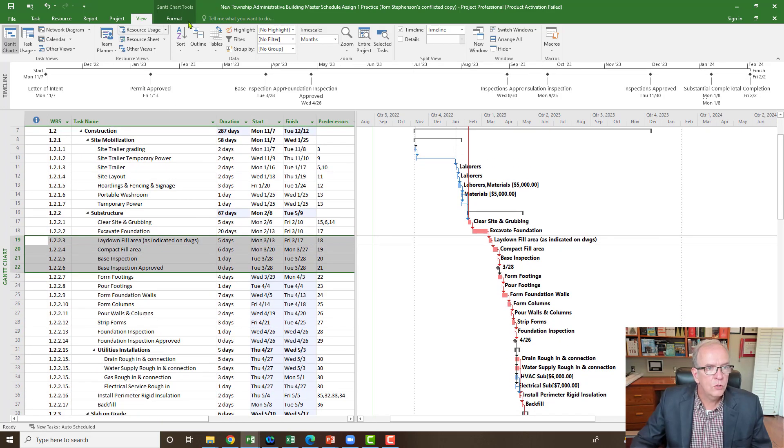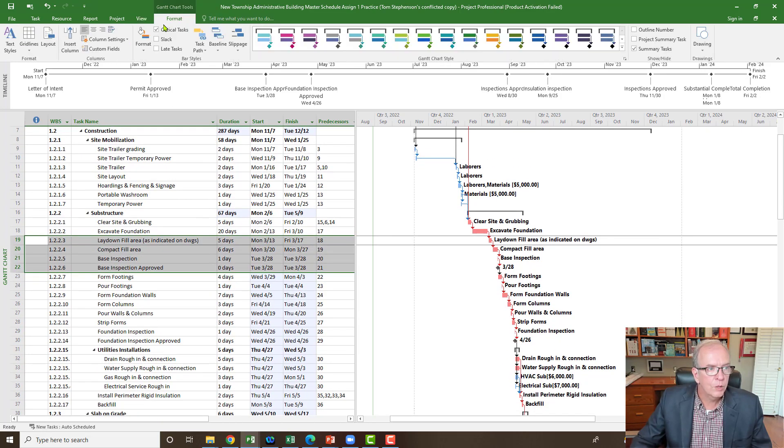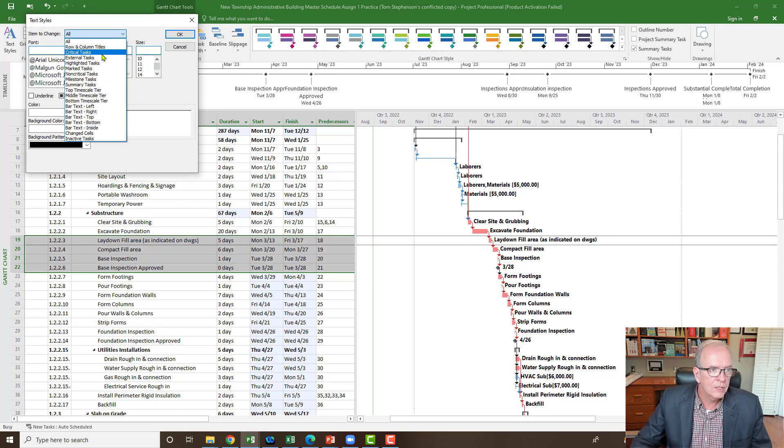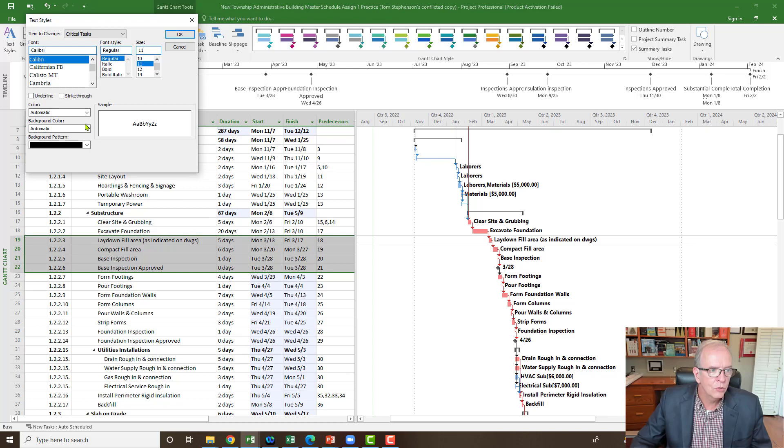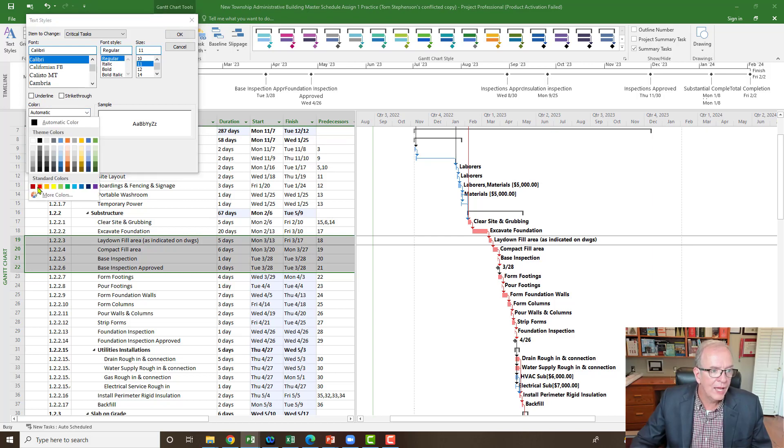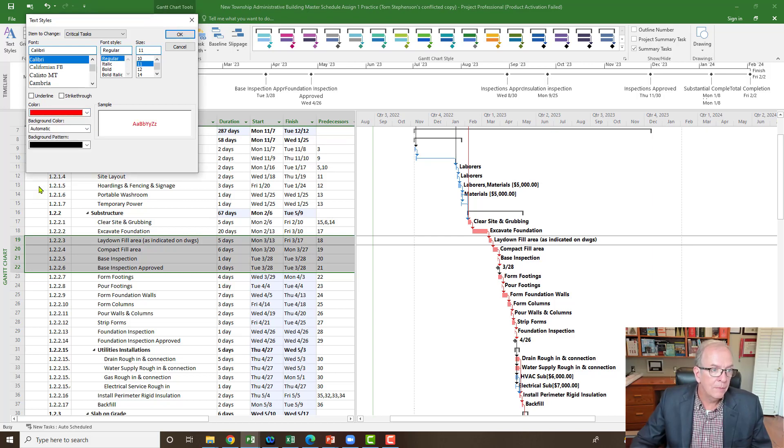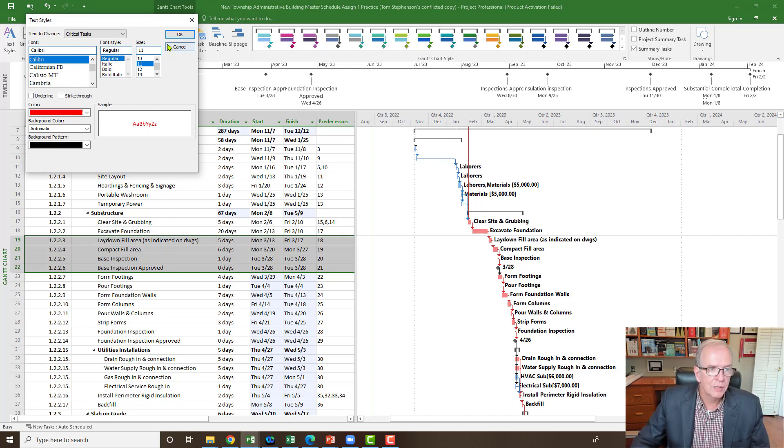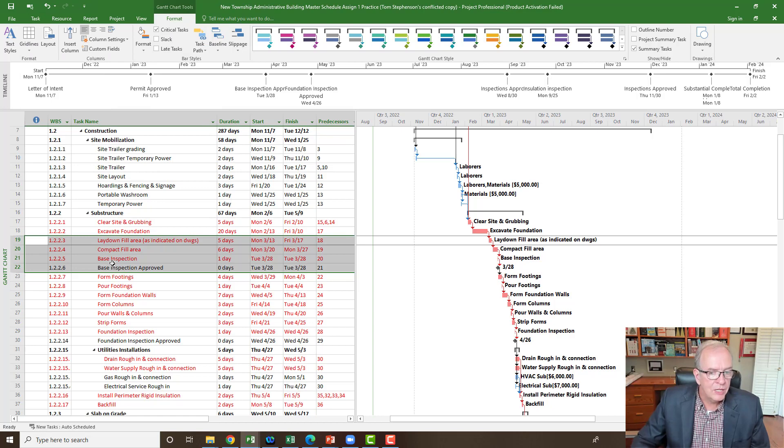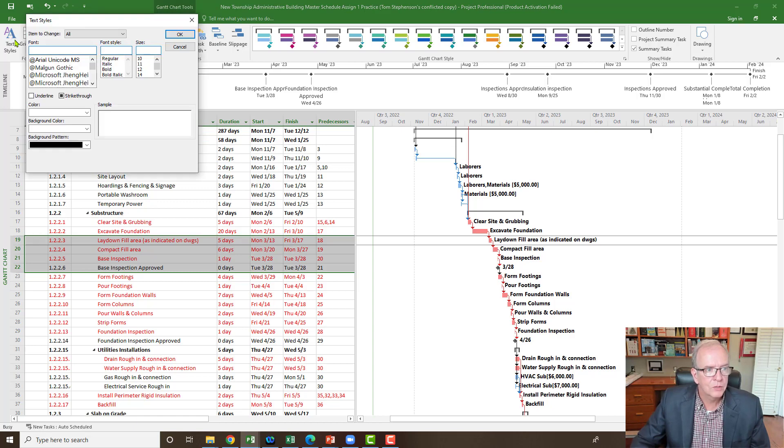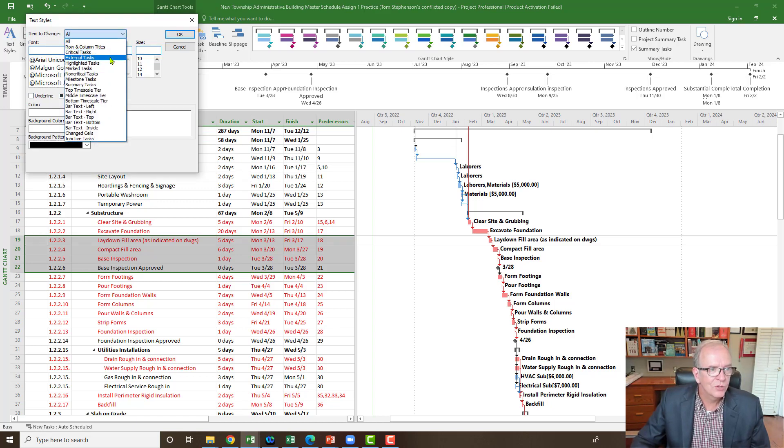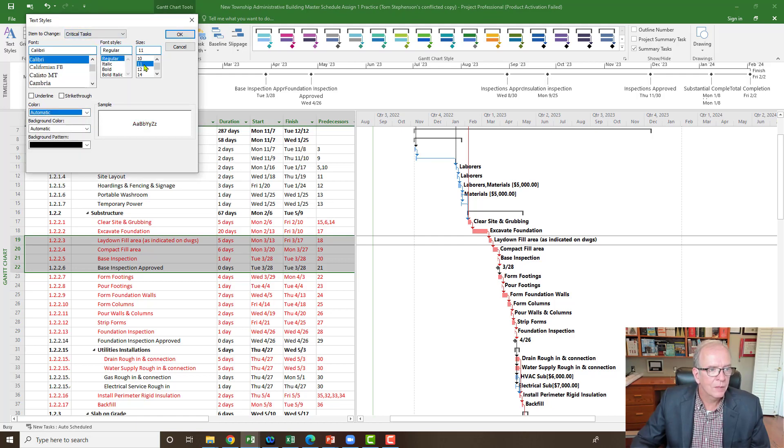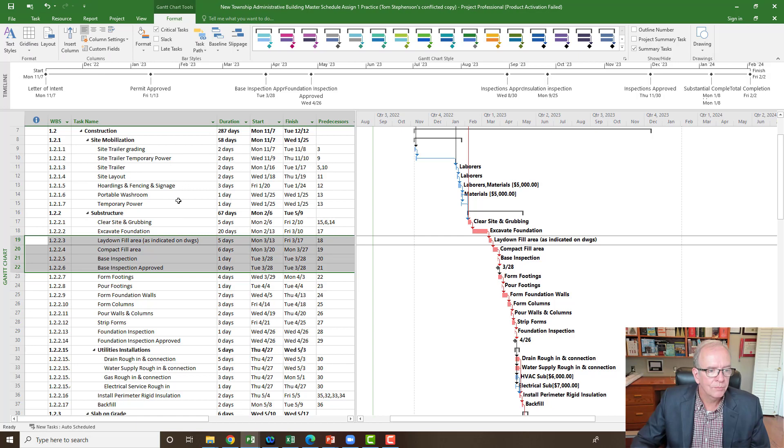Another thing you can do is under the format, you can go to text styles and you can actually color the activities. So if you want a critical task to have the text perhaps in red and maybe you want it in bold. Well, let's just make it red. How's that? All right. Because if you wanted to, you could also make it bold or whatever method, you know, you wanted. I could just make it bold there. But this way you see all the critical tasks in red. Some people like to do that. Not sure that I'm a little bit colorblind, so it's maybe not my biggest thing. But again, I could go to critical tasks and I could say I just want automatic color and click OK. And that'll bring it back to the way it was.